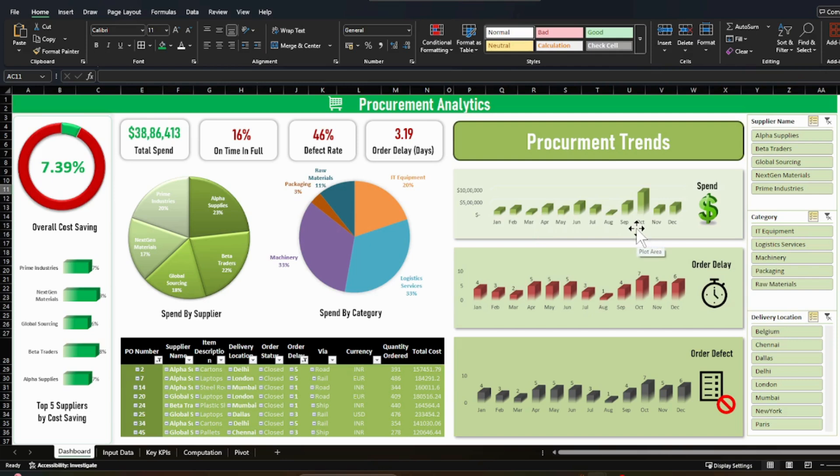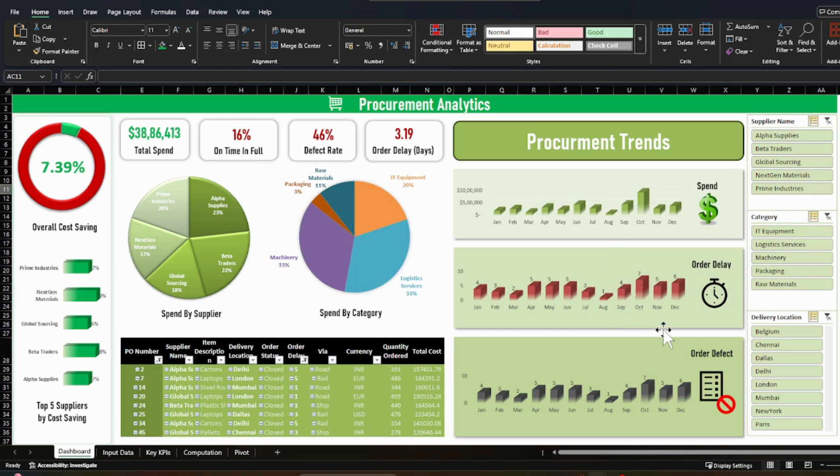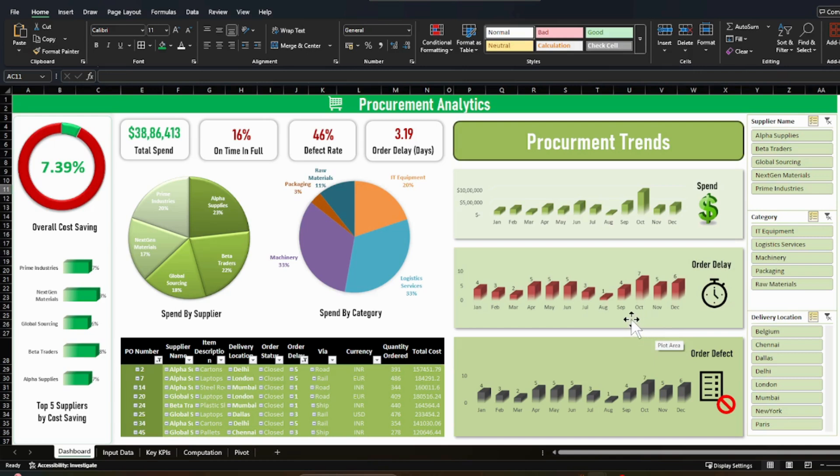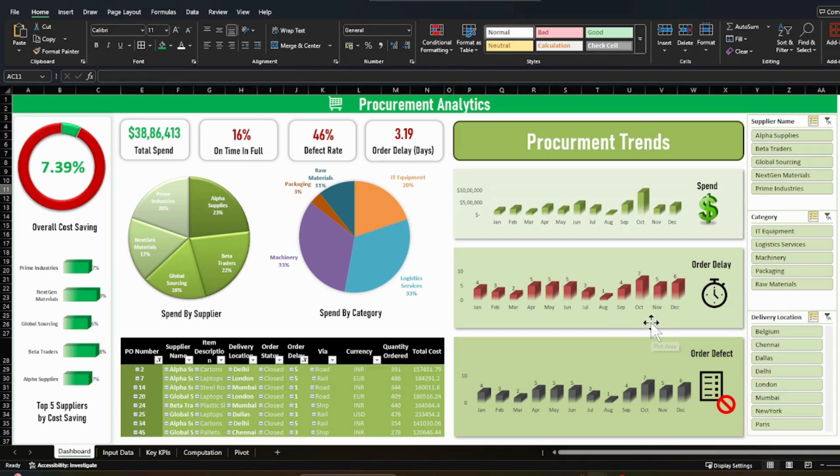And the same way you will also analyze that on which month you were getting more delays in order to receive your raw materials or any of your procurement deliveries. This is very critical because you want to get your procurement deliveries on time in order to run your plant or factory smoothly. If there is a delay in the raw material, everything else is going to be impacted.